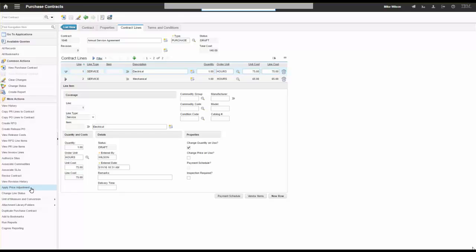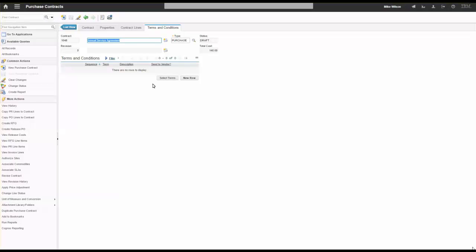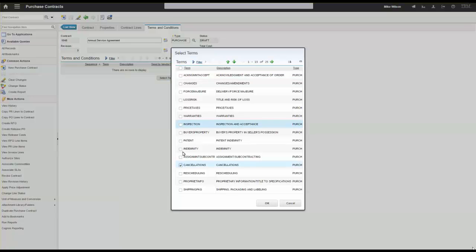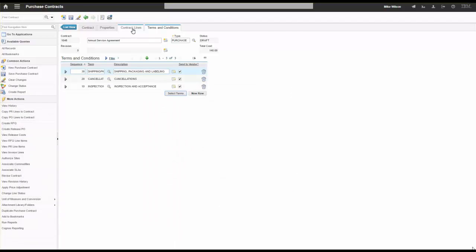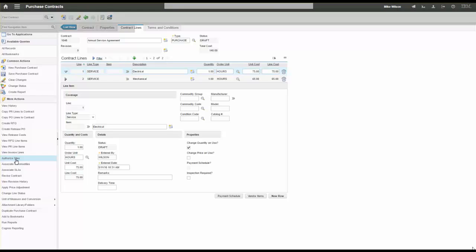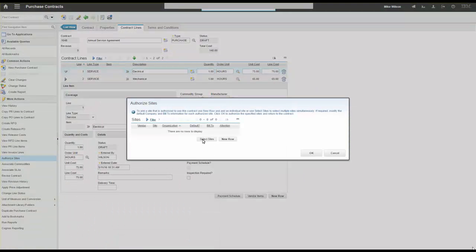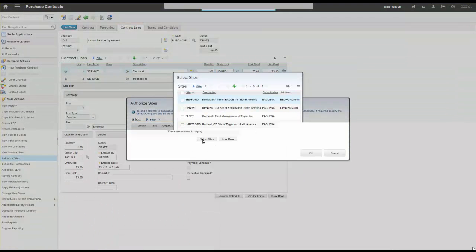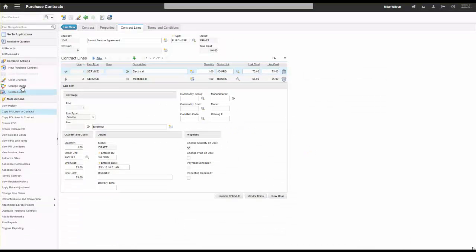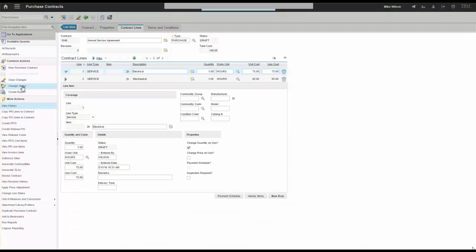Similar things apply — we can apply price adjustments, and terms and conditions are associated with the contract. One subtle step with purchase contracts: I need to authorize it for a particular site, since purchase contracts operate at the site level. I'll select the current site, click OK, and then approve this contract.